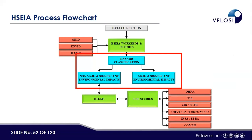The first step — the HSEIA workshops including OHID, ENVID, and HAZID — is now completed. The next step is hazard classification. As explained when discussing the process flow chart, we classify hazards into two categories: non-MAH (non-major accidental hazard) and non-significant environmental impacts, and MAH (major accidental hazards) and significant environmental impacts.